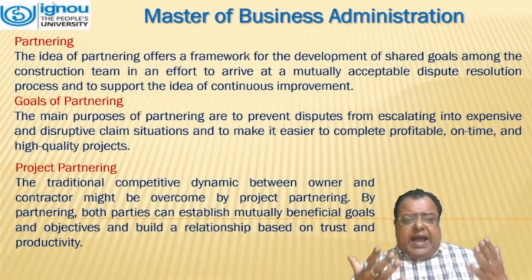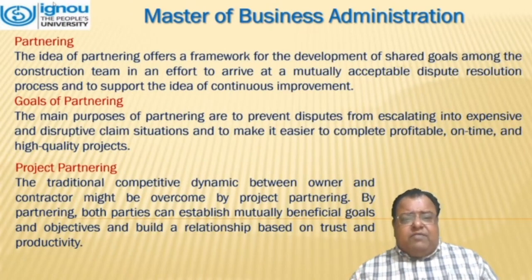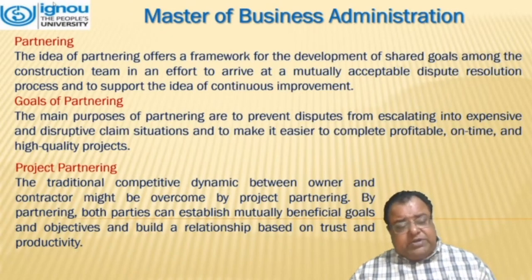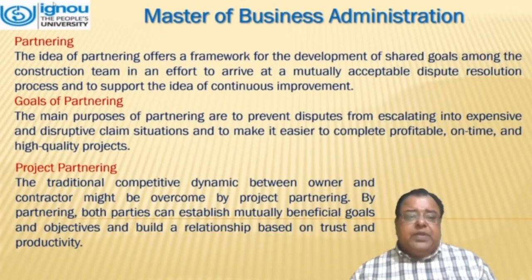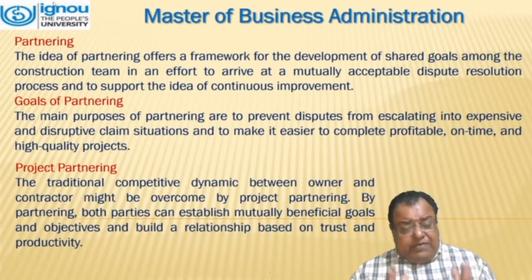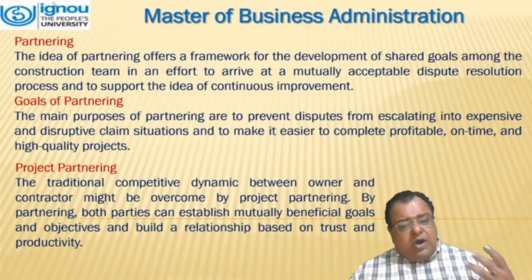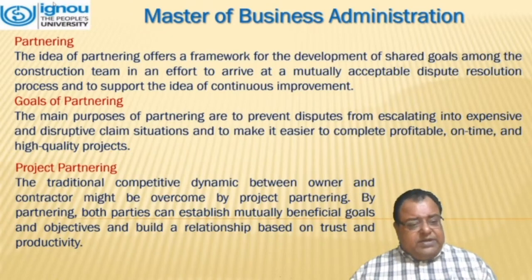Partnering. The idea of partnering offers a framework for the development of shared goals among the construction team in an effort to arrive at a mutually acceptable dispute resolution process, and to support the idea of continuous improvement. Goals of partnering. The main purposes of partnering are to prevent disputes from escalating into expensive and destructive claim situations, and to make it easier to complete profitable, on-time, and high quality projects.